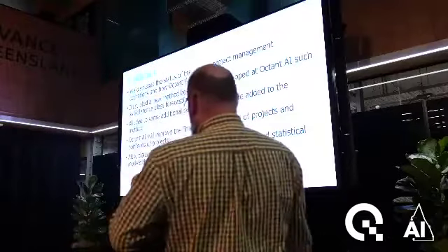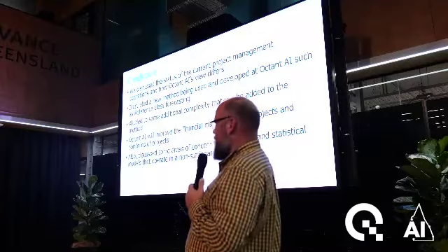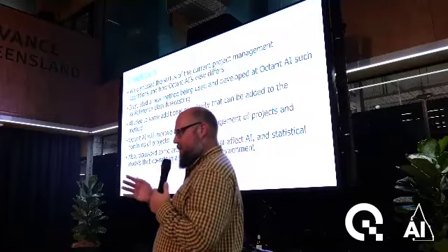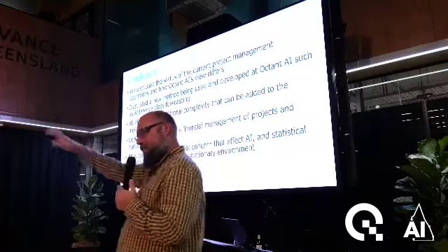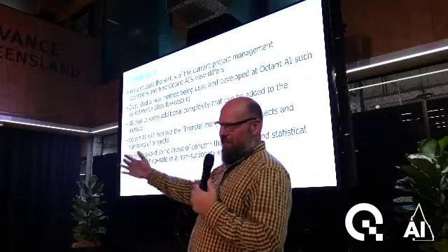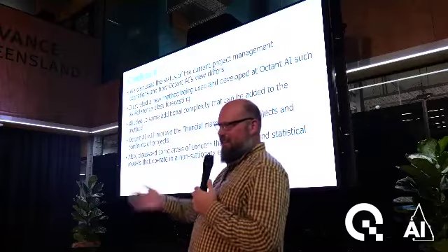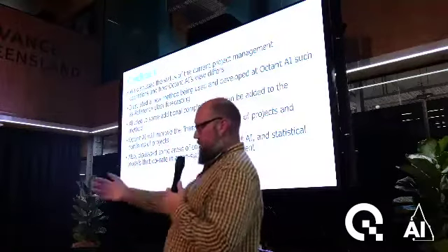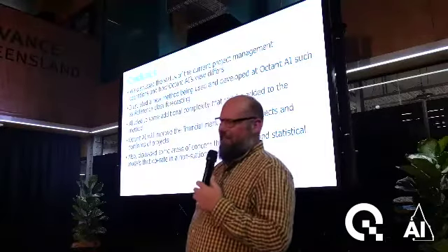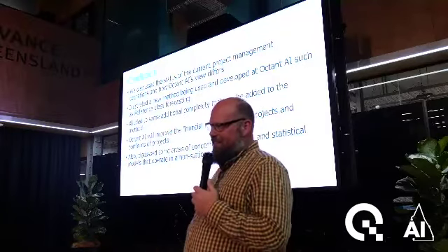And that can sort of happen. I get the feeling with our customers too, you'll tell them one thing, they'll learn a little bit, but then all of a sudden they start changing scope or asking for new things that you didn't even promise to deliver. So that's scope creep. The goalposts are moving as you're going forward, and that's a very common thing in IT projects. As soon as somebody sees something, they go, oh, can you do this, and then they start trying to push it onto you. At some point you've got to be a bit nasty and push back, and say, this is what you're paying for if you want that. Isn't that agile? Yeah.